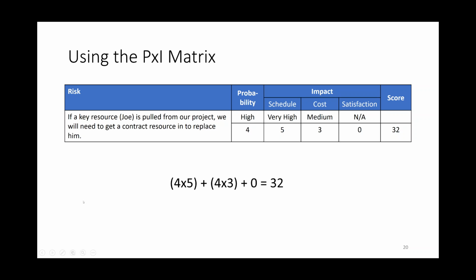And one of the benefits of using those multiple probability impact matrices is you can look for clusters of risks. Like you can say, what are all these risks up here that have a very high probability but a medium impact? And are they all related? Maybe they're all sitting in one pocket in your risk breakdown structure, and you can develop a response that can wipe them all out.